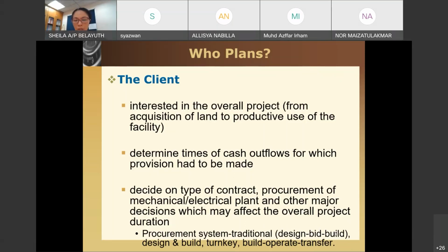So you can see the phases: design, then tendering and contracting, three different stages and different organisations. So designer will be just designers. Once design dah siap, it will be turned into the tender document first. So open tender or closed tender. Normally open tender lah kalau traditional. And when it has been won by the contractor, then contractor builds. So actually traditional is the most commonly used procurement system to sign the contract between the different stakeholders.